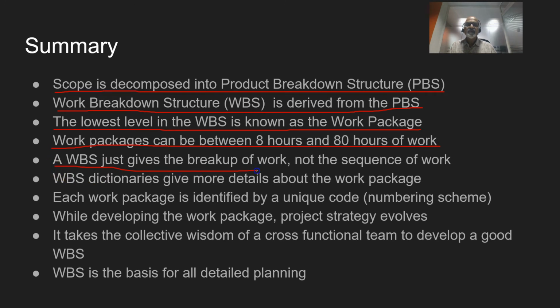A WBS just gives the breakup of work, not the sequence of work. So that is very important. A WBS doesn't sequence the work packages, it just gives the breakup of the work packages involved in the project. So it doesn't give you a timeline because it is not sequenced based on their priorities. WBS dictionaries give more details about the work packages, and each work package is identified by a unique code or a numbering scheme.